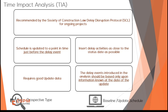TIA is recognized as a robust methodology for determining the impact of delays on both project timelines and costs. One of the main reasons TIA is so effective is because it allows us to analyze potential delays prospectively — before they actually occur. This forward-looking approach is similar to Impacted As Planned, but with a crucial difference: TIA relies on the most recent schedule updates, giving us a more accurate and timely analysis.